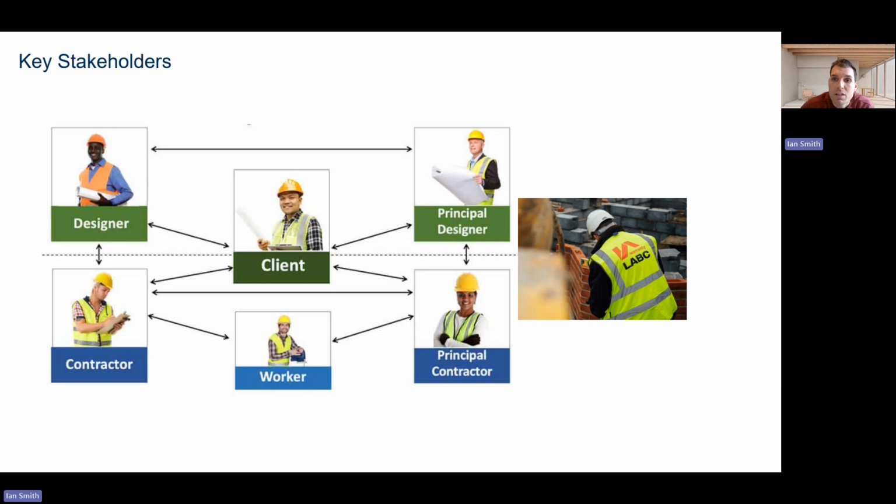So effective planning ensures that all excavation, drainage installation, reinforcements and concrete pours are carried out in the correct sequence within our 10-week allocated time frame. This requires coordination between labour, plant, materials, and inspections to ensure the work progresses efficiently without delays and safety risks. From an operational perspective, planning allows the project team to identify critical activities which must be completed on time in order to avoid delays.